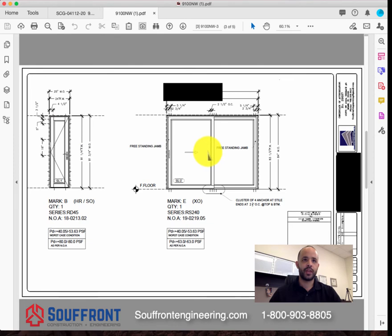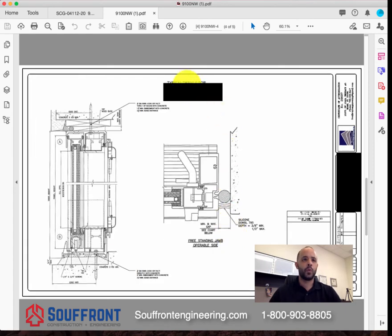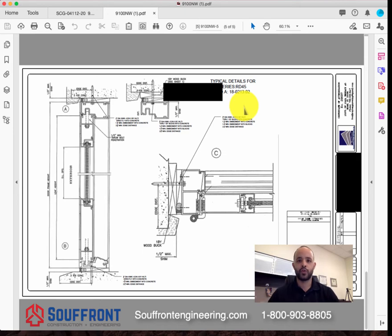We show the configuration and like to put as many dimensions as we can. We show the spacing of the anchors, the NOA, the quantities, the mark, worst-case condition pressures, and the pressures as per the NOA. We like to show typical details of each series — so these are the details for series RS 240, and these are the details for product RD 45. These details are required to be listed when you submit these drawings to your municipality.